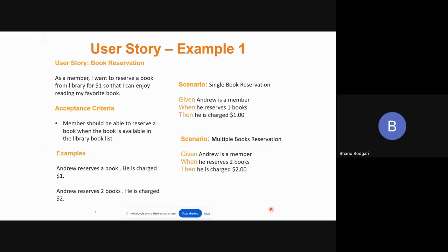But when we are in the backlog refinement, this is where I would say we should use BDD, because all that we want in the backlog refinement is for everyone, not just the product owner, but the team, to have complete understanding of that user story. Definitely before sprints itself, because we are trying to understand that user story. Backlog refinement is nothing but the user story being refined.